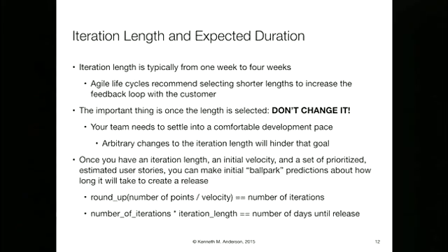So if your team has suddenly gotten used to 3 iterations of 2 weeks each, there's a whole bunch of stuff that's going in there. On other things we might call it muscle memory, where you're just getting into the flow. This is what I do every day. This is how my week evolves. This is how the iteration evolves. And if you get a team on that and they start to become productive, and all of a sudden you say, nope, the iteration is now going to be 5 weeks, or it's going to be 2 weeks, that can have a huge impact and push back things as the team has to suddenly readjust to how it goes. So arbitrary changes to the iteration length are not good and will actually hinder progress and hinder getting to the goal.